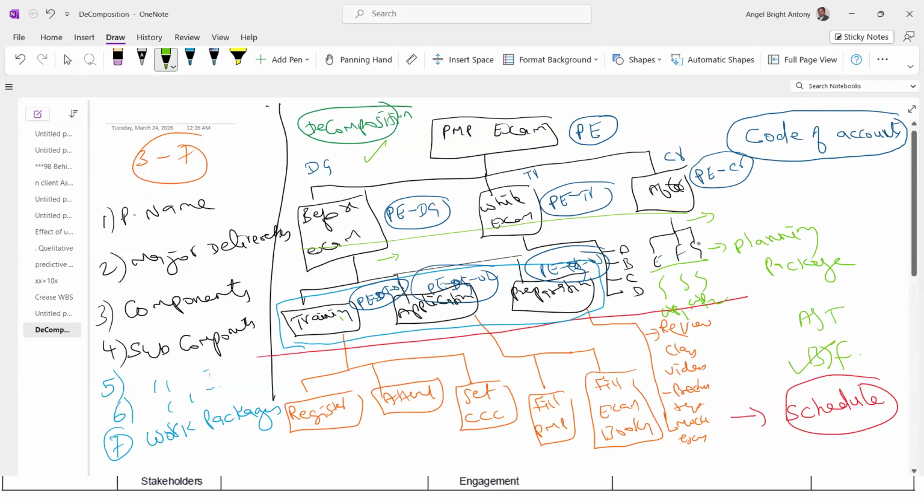Your activities are not even part of WBS. We discussed the lowest level of WBS is your work package. So it's not a list of tasks. Keep in mind, WBS is not a list of tasks. The tasks or activities are not even part of WBS. They are in your schedule. We'll talk about that later.